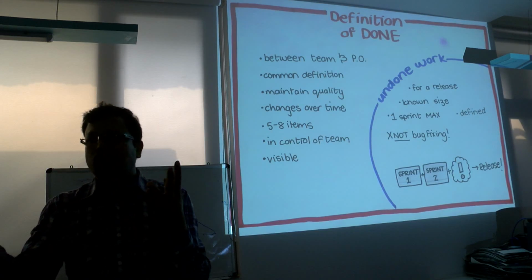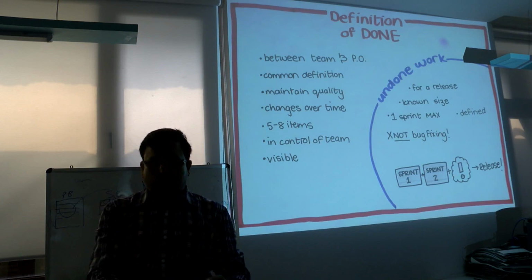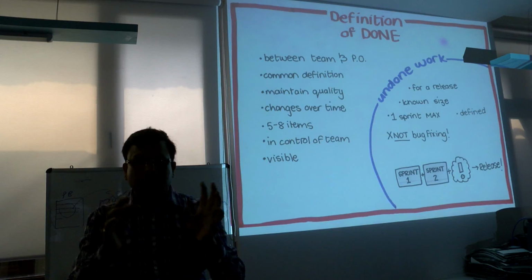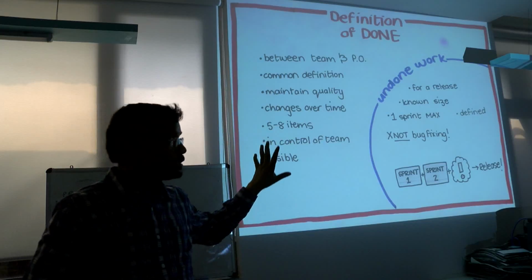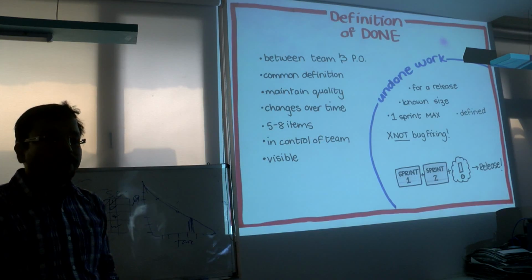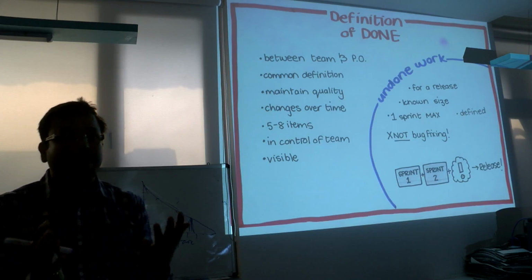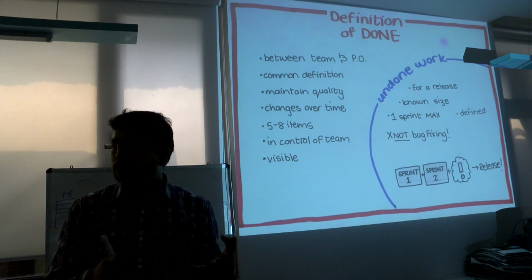The last day will generally be the review day. You have to come with your VM or your CI server, the central server, with the team, the PO, a Scrum Master, team members, and a stakeholder also. Here the stakeholder will present in the review meeting. Once he checks against your acceptance criteria, if anything mismatches, you have to describe why this is a mismatch.